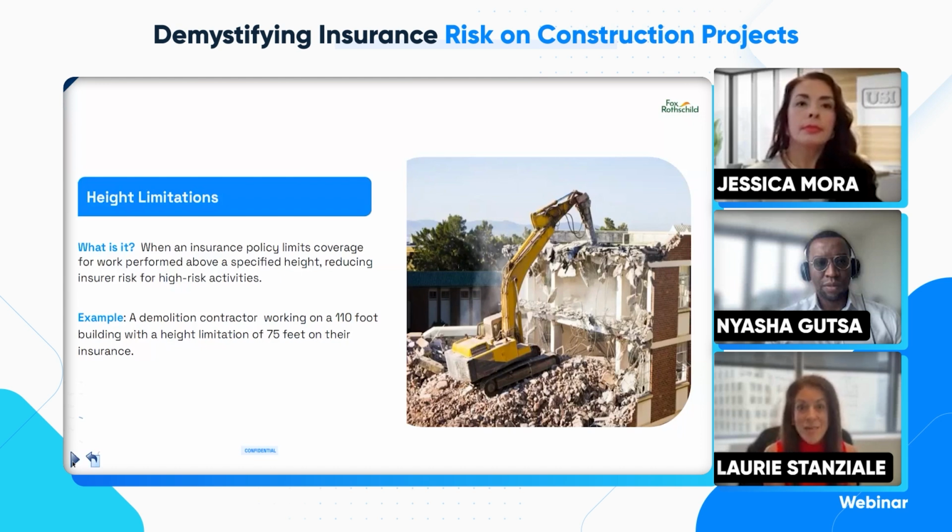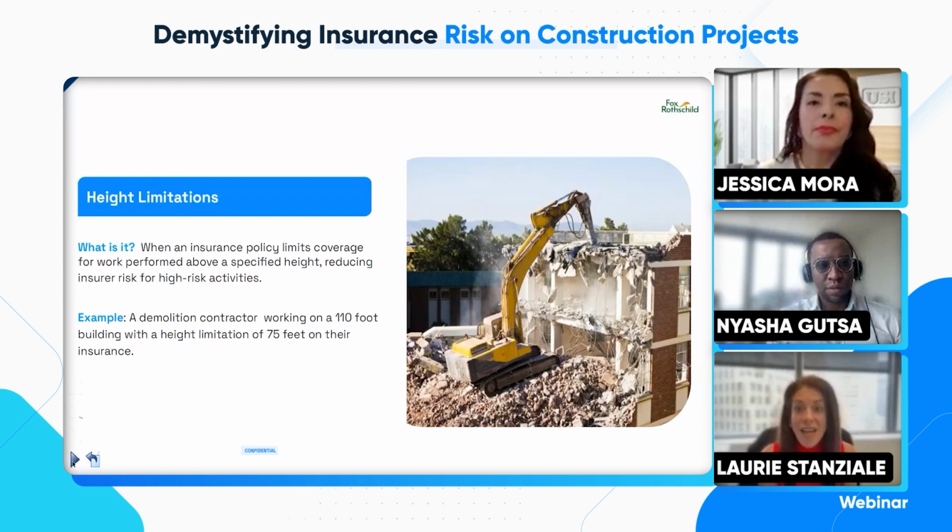My client actually said to me, true story, and I won't obviously tell you who this was, well, if we're able to lop off the top 10 feet of the building and we're down to 100 and the occurrence happens later, are we okay? And it's not an illogical question to ask, but the answer is no, you're not okay. Because the entire project that the demolition contractor is doing is the demolition of a 110-foot building. And in that instance, you would have no coverage should someone be injured when they're down to the second floor. So a height exclusion is very important while you're doing demolition.